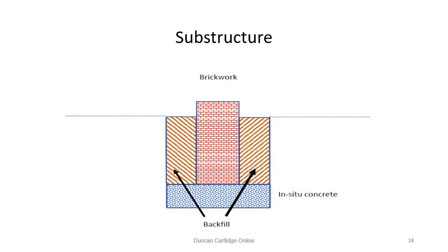When the foundations are complete, the trench will have to be backfilled with excavated material, as shown here. The best way to calculate the net amount of backfill required is to allow for the trench to be completely filled with material. See page 15. And then later, when the concrete and the masonry is measured, deduct the volumes displaced to leave the net volume.